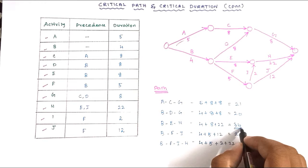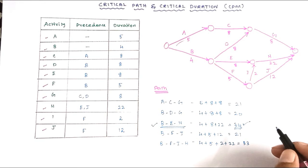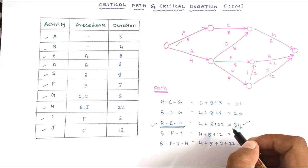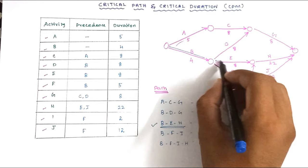The longest duration is 34, for path B–E–H: 4 + 8 + 22 = 34. This is the critical path and 34 is the critical duration. We highlight B, E, and H as the critical path. This is the critical path method for solving problems related to critical path and critical duration. We will see the next problem — thank you.